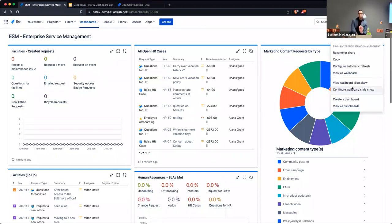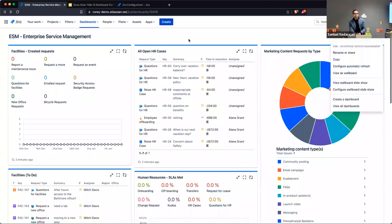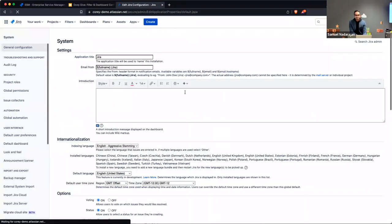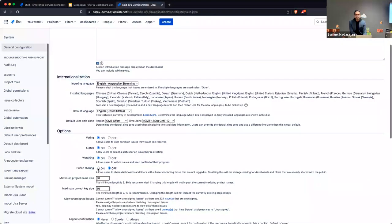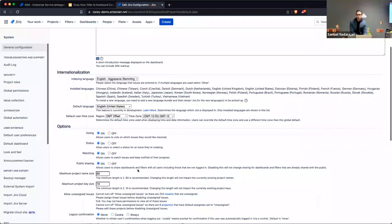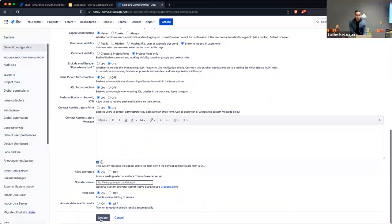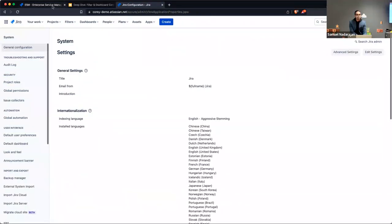One thing I want to bring up: right now you have to log into your Jira site to see these filters and dashboards. But you do have the ability, if the use case necessitates it, to share some of this information publicly. A Jira administrator would go into the administration settings, click Edit Settings, and there is an option — off by default — to publicly share filters and dashboards with people who are not logged in.